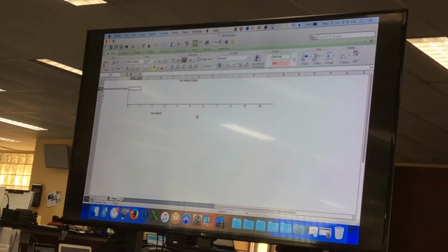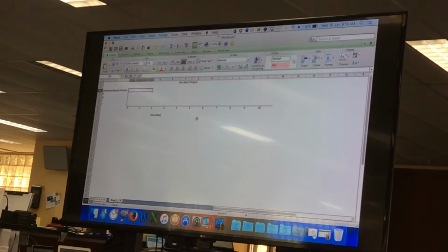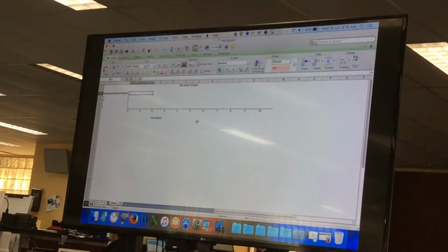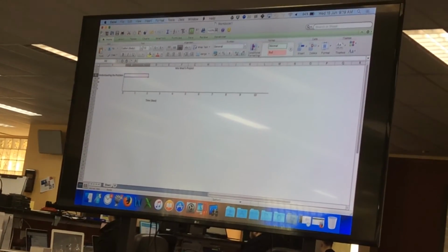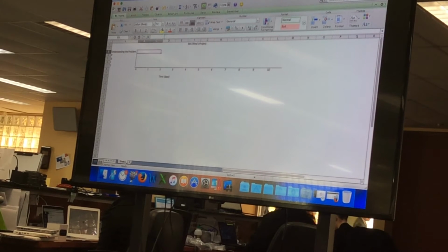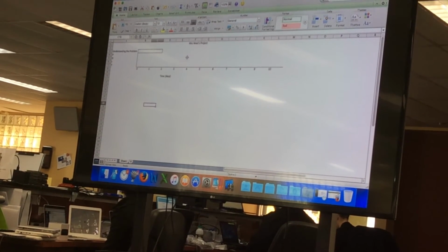We start to work out how long each of our stages take. And again, we're just going to draw a border around each task and how long it goes for. So let's say understanding the problem requires us to be working on it for 2 whole days. So I've selected 2 cells there. And again, I'm going to cheat by just doing an outside border. Turning that on, now you can see that there's a block there representing that time frame.